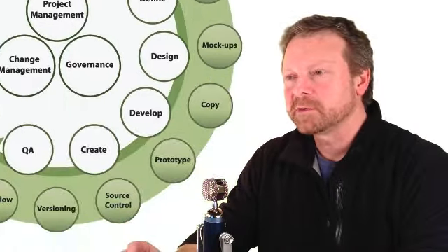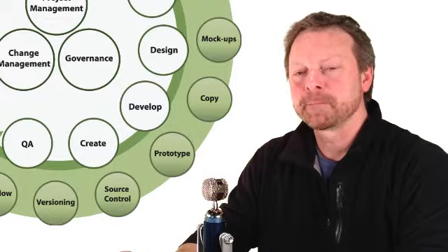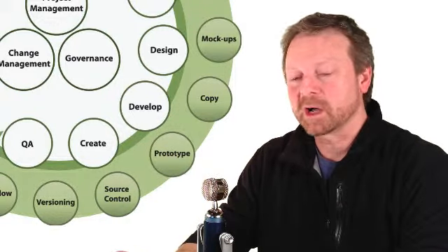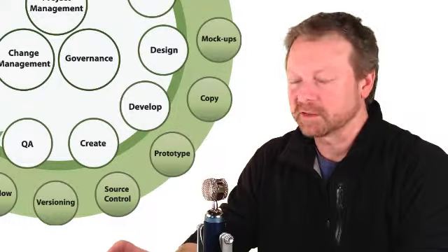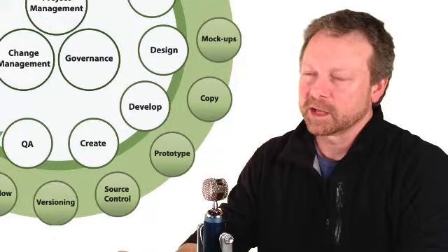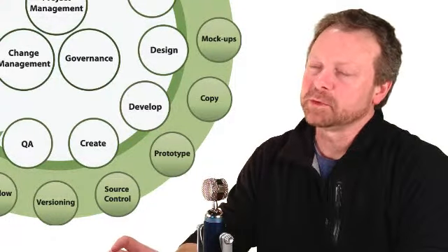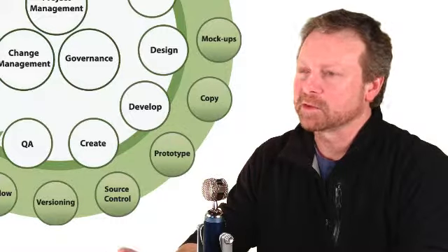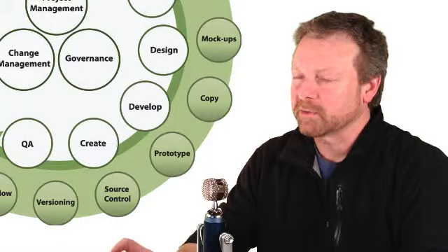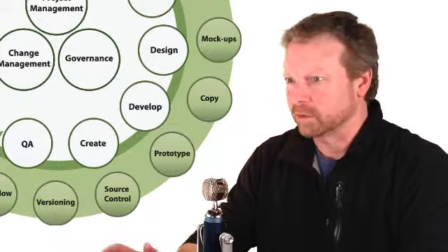I always find that reinforcing your requirements with some degree of a mock-up, whether that be a full HTML mockup, or perhaps even using something as simple as PowerPoint or drawing it out, always helps to solidify the requirements so that individuals who are involved have a much better idea of what it is that they're agreeing to.